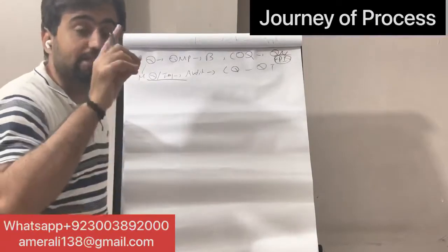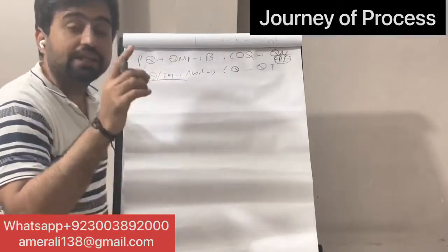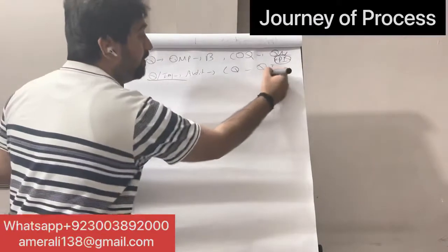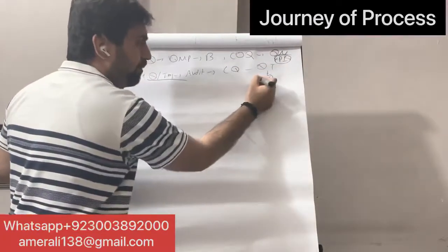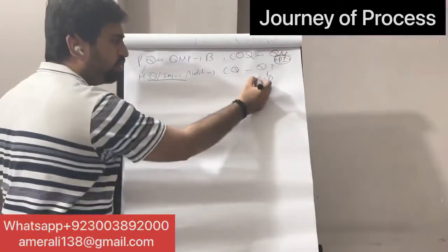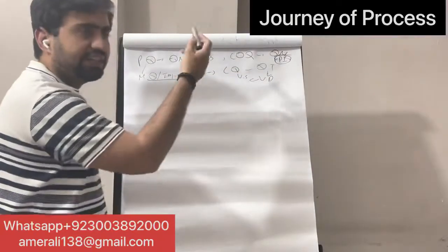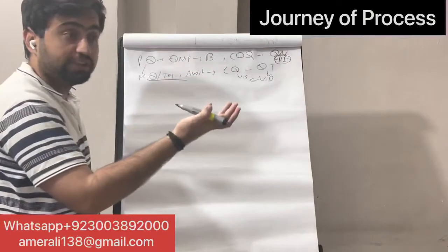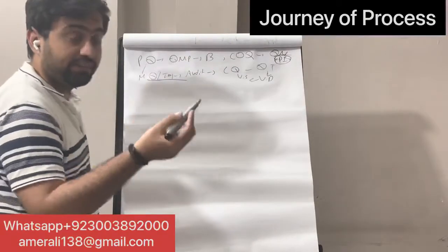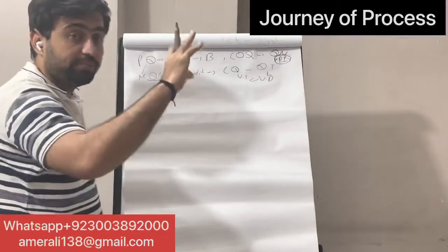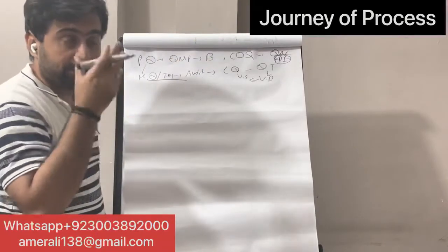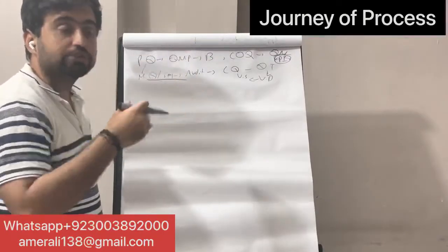If the deliverables are according to the quality management plan, internally the team says the deliverables are verified deliverables. Then these deliverables go to the customer, validate scope and become accepted deliverables. You use checklist, scatter diagram to find the correlation. You use Pareto if there are defects to rank the defects, 20-80 principle, what the major defects are, and you use flowchart to see the sequence of the processes.